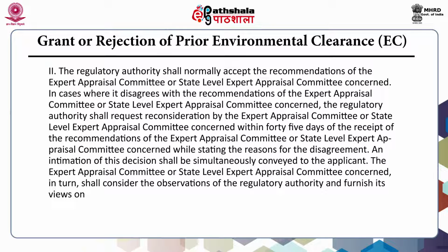An intimation of this decision shall be simultaneously conveyed to the applicant. The expert appraisal committee or state level expert appraisal committee concerned in turn shall consider the observations of the regulatory authority and furnish its views on the same within a further period of 60 days.